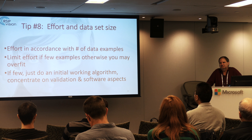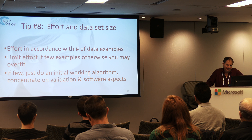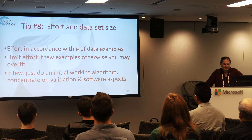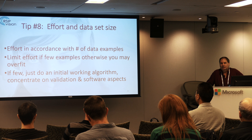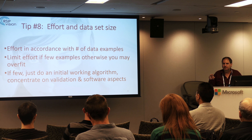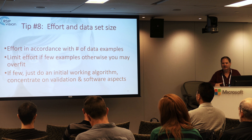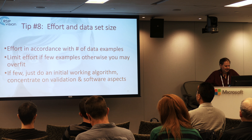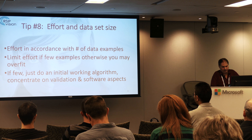Tip number eight: effort and dataset size. Sometimes you start a project with only 10 examples, and the hardware engineer tells you the future images will be much better. Remember that you have to limit the effort if you have few examples — otherwise you may cause overfitting. If you have 90% success with only 20 images and are trying to fight for 2 more correct images, that is not the way to build robust software. Use that time to do other things in the system — maybe other tasks important for the next stages. If you have very limited data examples, don't invest too much at the algorithmic level: only what is needed.